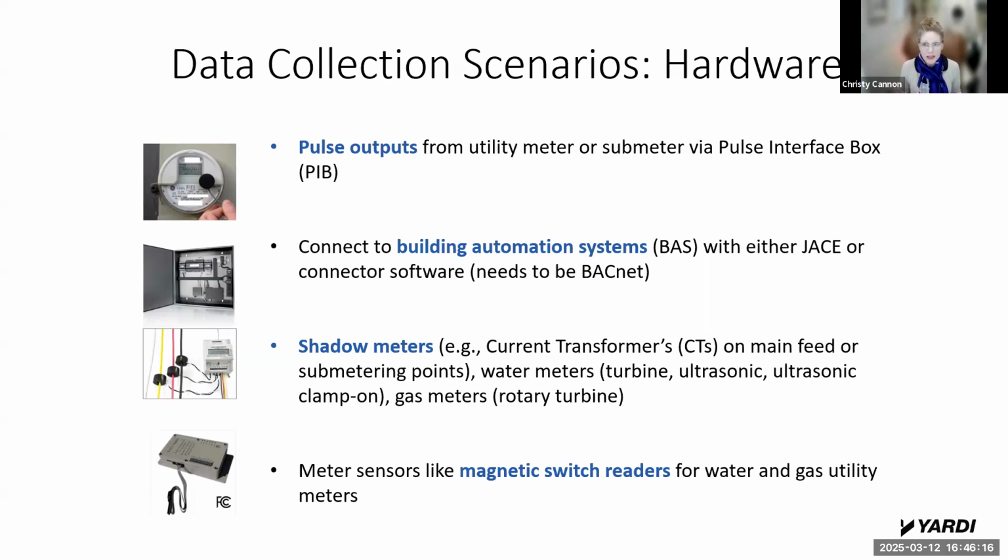Plumbers will come in, they'll assess the situation, they'll say, you know what, your plumbing is like 30, 40 years old. We're going to charge you $70,000 to replumb this whole portion before we'll install this inline turbine meter for you. Or they'll come in and say, ooh, you don't have enough length of horizontal pipe for the meter that you want to install, so we're going to charge you a bunch of money so that we can replumb this whole room.